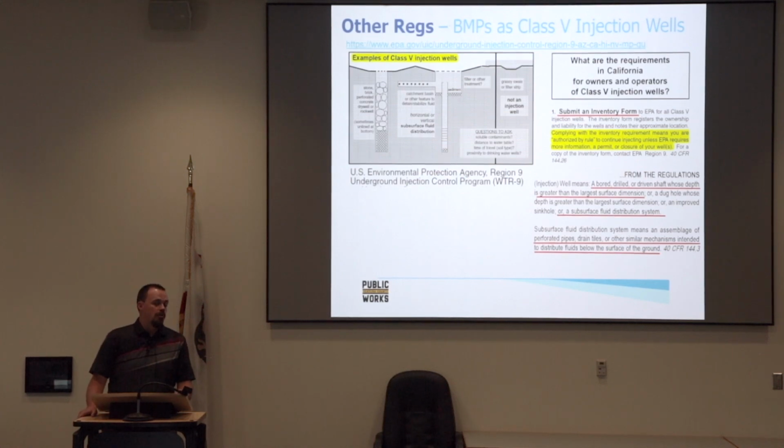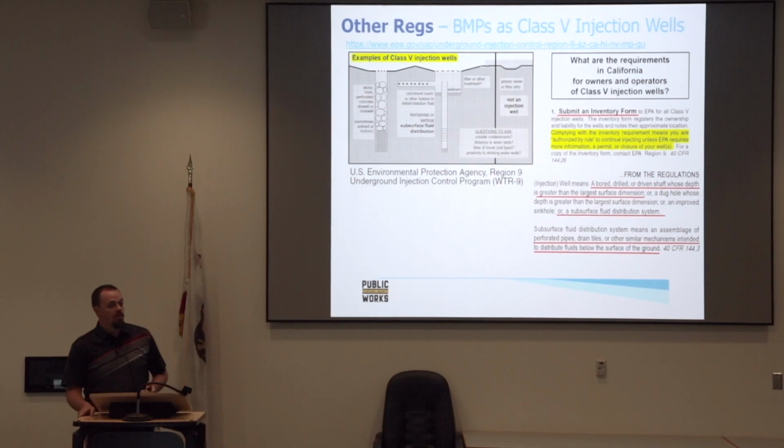Yes. These dry wells we put in are only 15 feet, so they don't qualify for a lot of those, but that would be more discussion with our groundwater department because they do have ordinances and regulations for what are permitted wells that they would monitor and give permits for. So you didn't need permits under that depth? We did not have to, no.